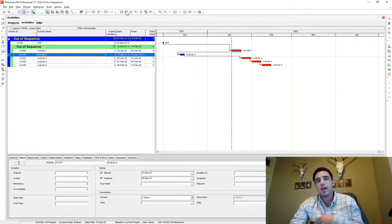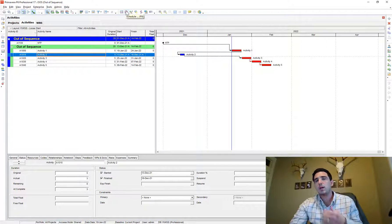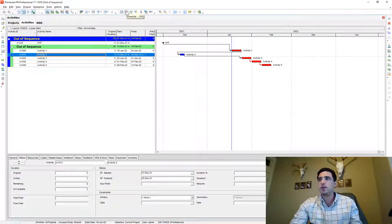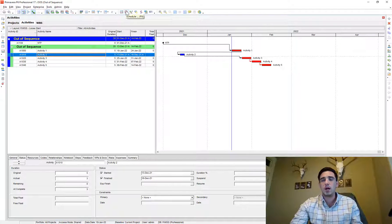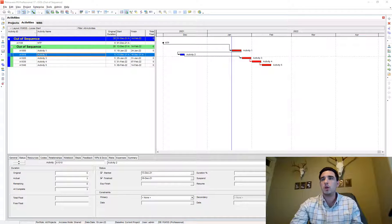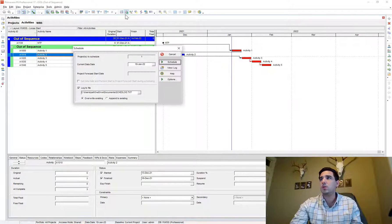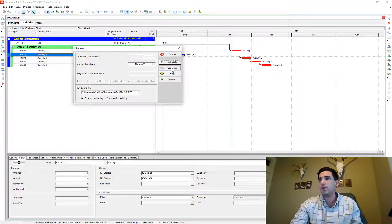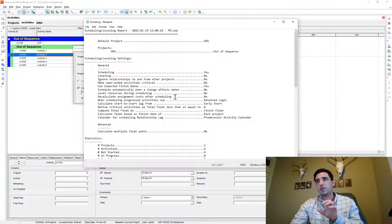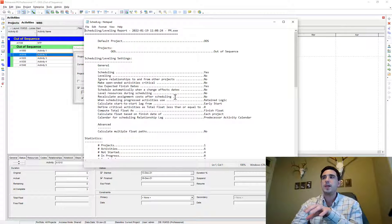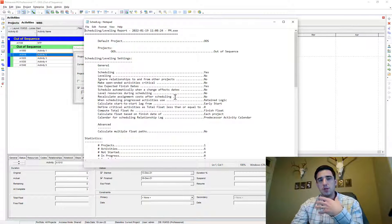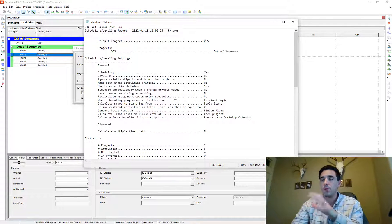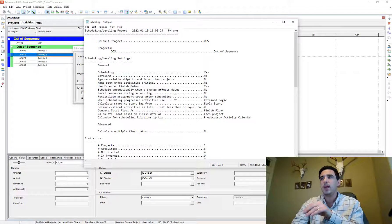And it creates a log, it has like an internal log that P6 creates where you'll go back to the schedule button. And now we can view the log. It's very important that you schedule first because that's what generates the log file for this schedule.